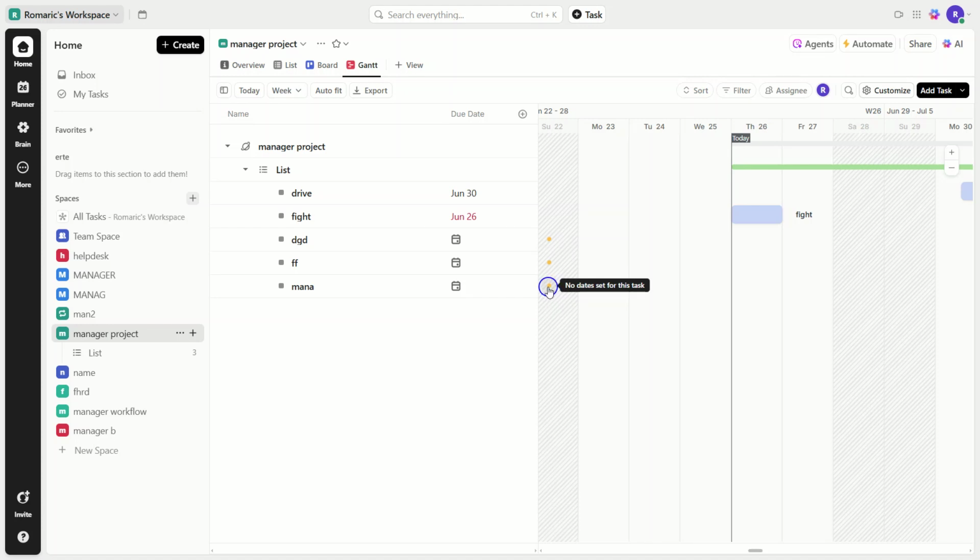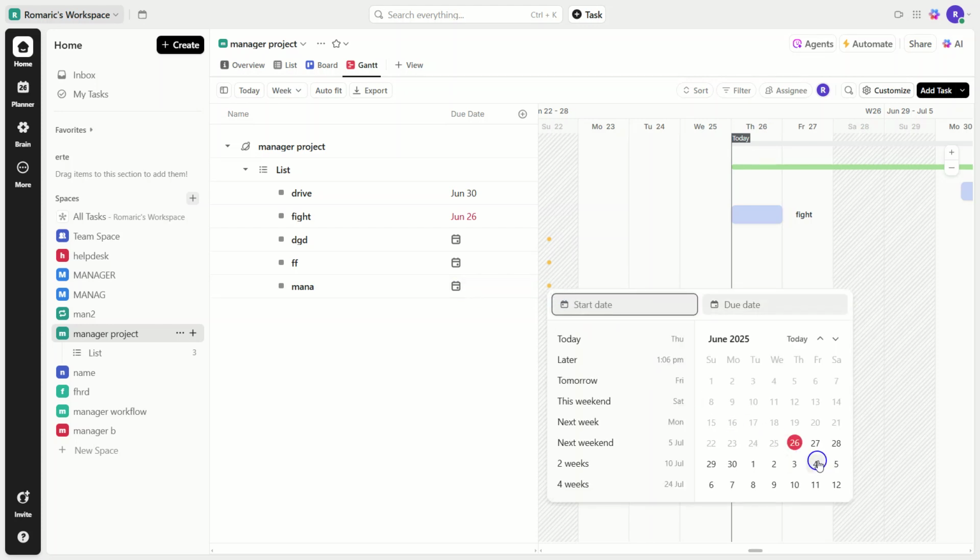You do this by clicking on a task and dragging an arrow to its dependent task. This helps us because it creates a visual link between tasks, showing you what tasks rely on others for completion.